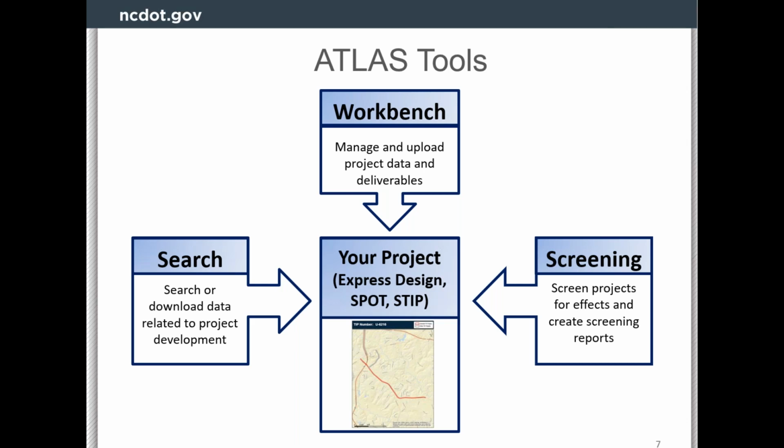So as the project enters project development and the engineering consultants and planners are working on projects and they're developing reports, not only the final environmental document, but all the documentation surrounding that final environmental document, lots of maps are generated, lots of PDFs are generated with maps in them. We standardize that process, all the way down to the naming convention of the PDF files that are submitted, and also the data that we wanted to extract out of those standardized reports.